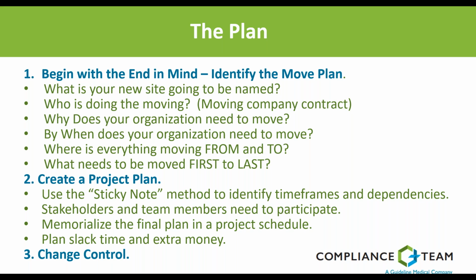And then, you've got to think about what needs to move first and what needs to move last. So that kind of segues into creating a project plan. And the way that I've seen this work, and it's worked very well for numerous projects, is that we start with just sticky notes on a wall and say, okay, we're going to be moving this, and then we're going to be moving that. And in order for this to go, we have to have these other prerequisites.